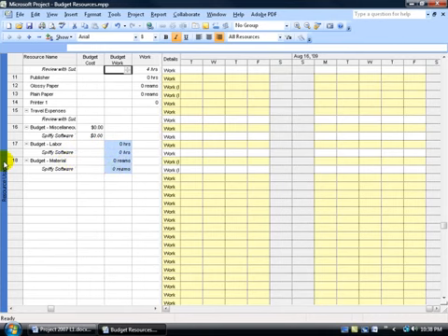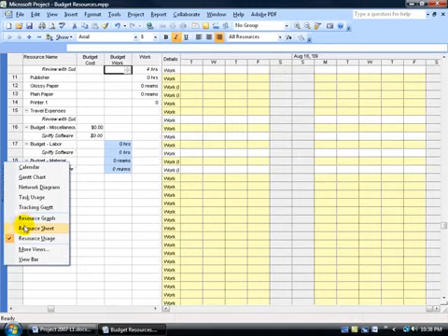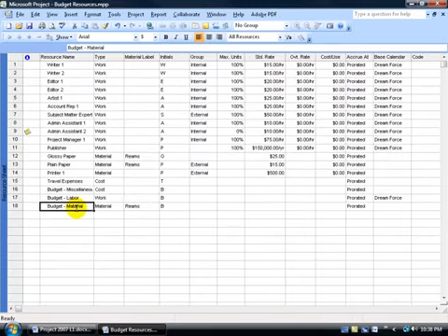If you recall, let me right click on the view bar and go back to the resource sheet. My budget material here has the material label as reams, so I'm keeping track of these two materials or setting a budget for those materials. I'm not setting a budget for the printer material.